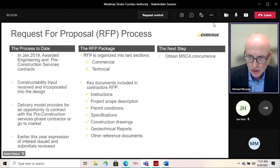I would just come back to Member Novak's question about decommissioning, if I could, for a minute. Just to put in context, I assume, Member Novak, you meant tunnel decommissioning at the end of the service life or at the end of the lease agreement. The tunnel agreement has provision for the development of a robust decommissioning plan that must be in place before a lease agreement is entered into with Enbridge. Time frame wise, if completion of the tunnel is on the order of 5 years, then during the next 5 years, where the lease agreement is developed between the authority and Enbridge, the decommissioning plan would be put in place. It needs to be robust, and would be part of a lease agreement.